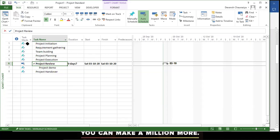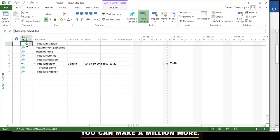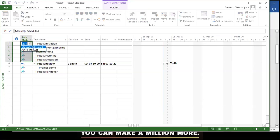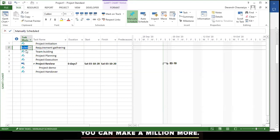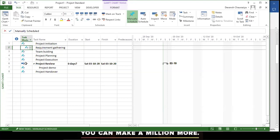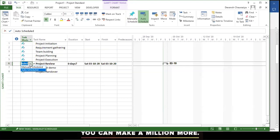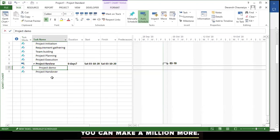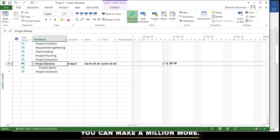These icons in the task mode column indicate whether a task is manually scheduled or auto-scheduled. Auto-schedule means that when this task is connected to another, it will automatically update its dates when anything changes.